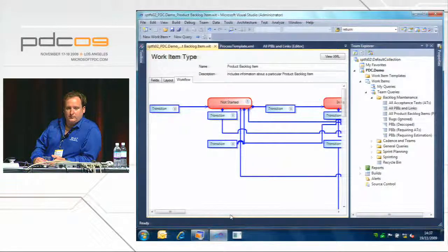I would agree with that, and you can actually even use the impeded by link to do that, because if you've got anything that's connected with the impeded by, it won't let you actually start it. So there's different ways of doing that, but not everyone wants to work in that way, so we didn't stick it in. So again, it's a complicated framework, but it's still a framework, and if that works for you guys, then you can put that in and link those things together. I said parent-child your PBIs together, or run it down the